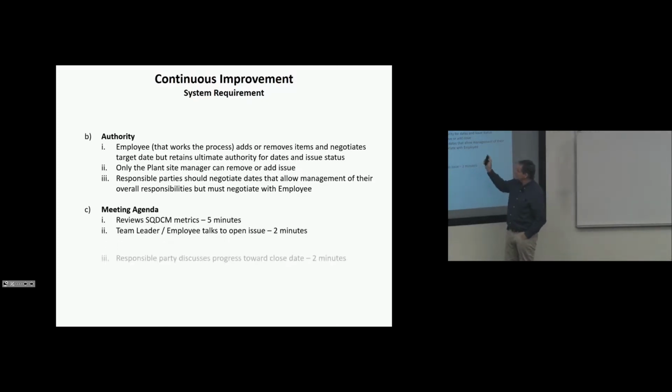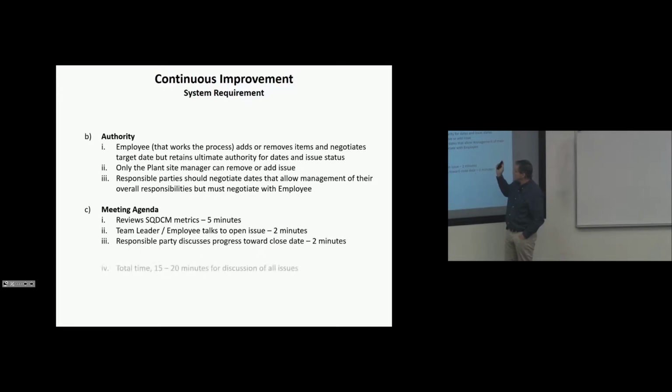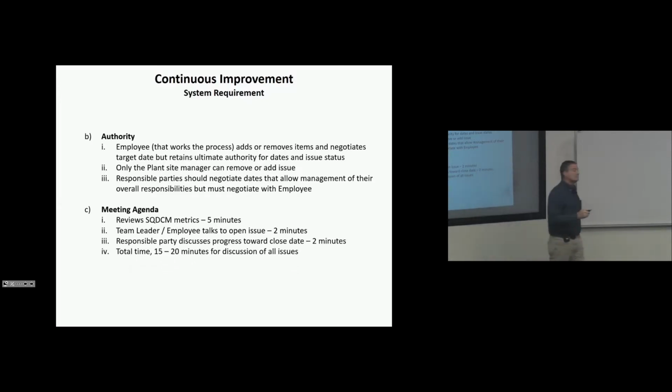Reviews SQDCM metrics, 5 minutes. Team leader employee talk to open issues, 2 minutes. Responsible party discusses progress towards close date, 2 minutes. Total time, 15, 20 minutes for all issues.